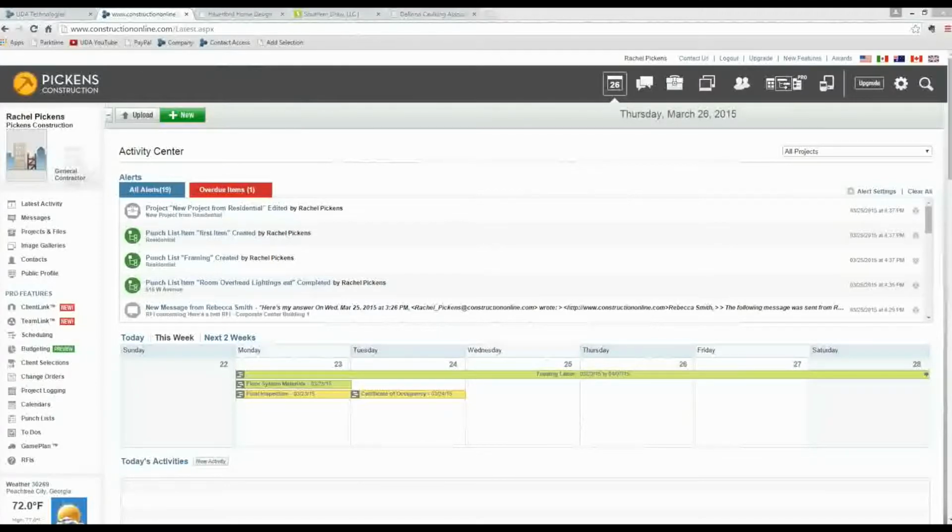Best thing about integrating with QuickBooks is you build the estimate in an estimating software. When you hit push to QuickBooks, it generates your entire items list, builds the project, and it's done. You don't have to do anything. You just hit save and close. Then you use QuickBooks just like you normally do for invoicing, but when you bill, you're billing for those specific line items, and if you're using POs and your bill trackers inside of QuickBooks, you're tagging those with those specific line items.